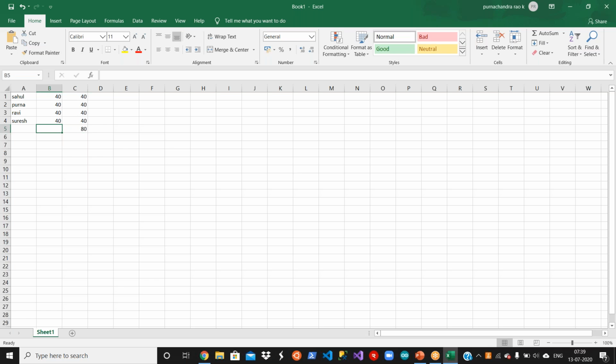Total is 80 hours. But what if the person is off? This guy is off for 5 days. Okay. Let us say this guy is off for 5 days. Then his capacity will be obviously what happens? 40 hours only. But what happened? You already planned 80 hours for Sahul. Okay. But he is off for 5 days.